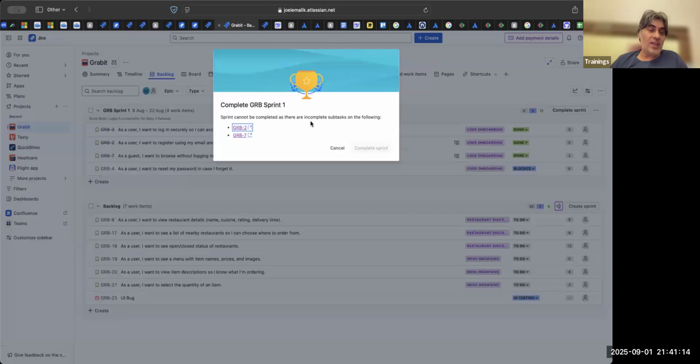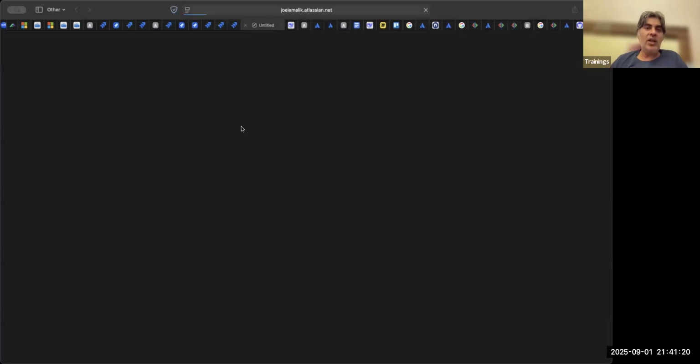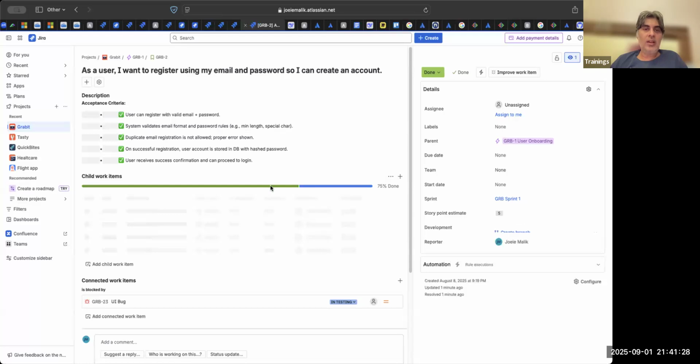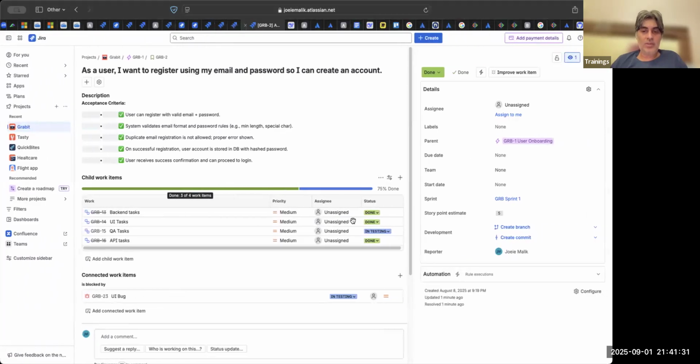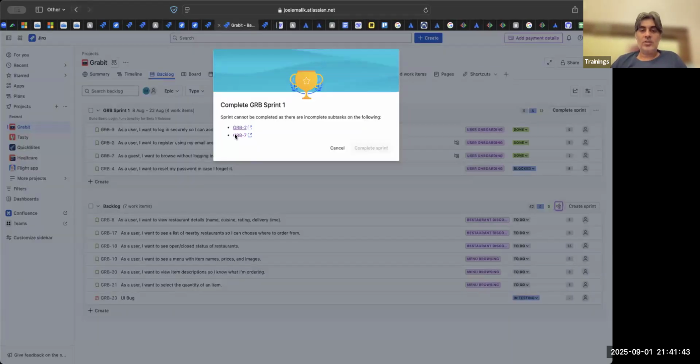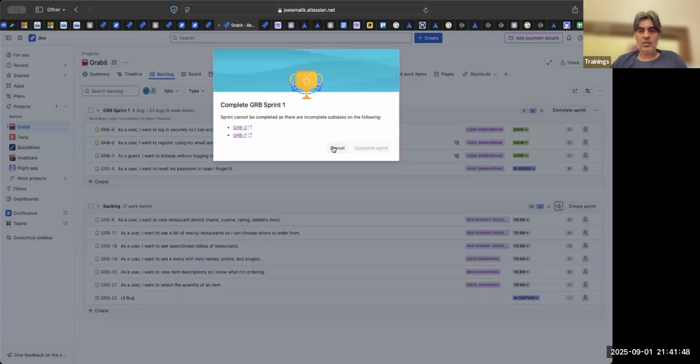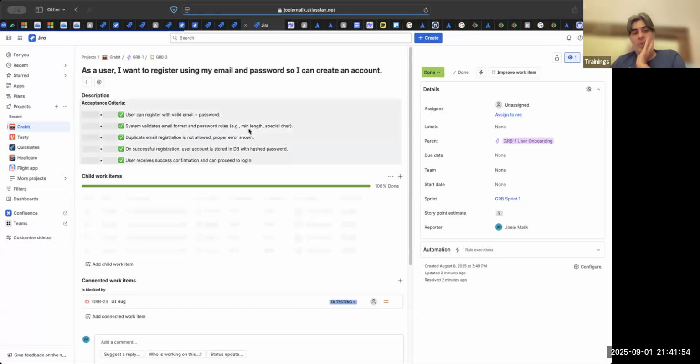So if the subtasks are not completed in your done story, it will not allow you. So typically your team will be lazy and people will not close their subtasks, which is why you have to be very careful that they update their subtask. So Priyanka did not close her subtask. Why did you not do it, Priyanka? Okay, now let us start. So then another story. This is a done story. I think the subtask would be in a. So all these subtasks need to be closed.